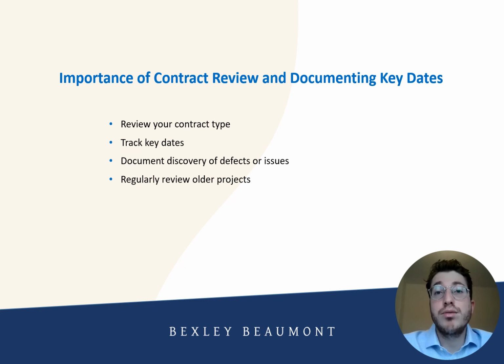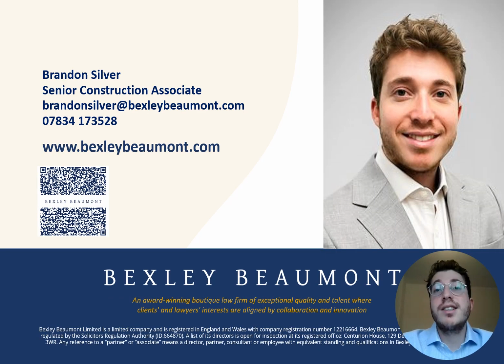For contractors and project owners, it's helpful to periodically review older projects that might be approaching the end of their limitation periods to determine if there are any claims that may be made. You could therefore make protective proceedings and then seek to stay those while further information is obtained. But by initiating that claim, you have stopped any claim from being time barred because it stops the limitation period from going any further. So that's a summary of limitation periods in construction.